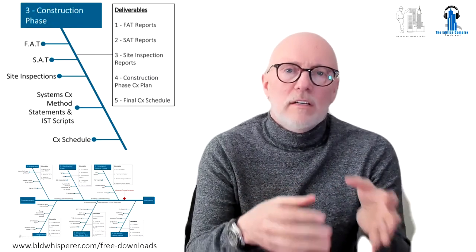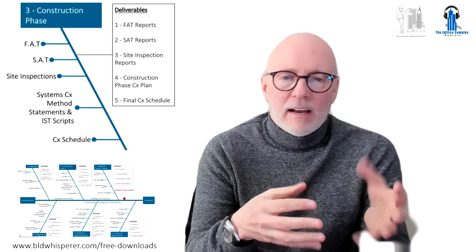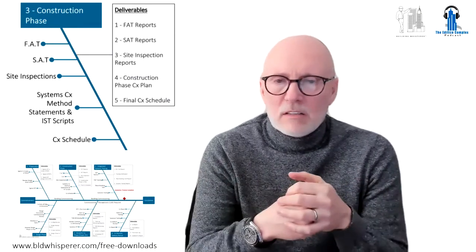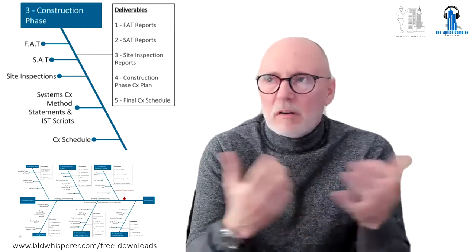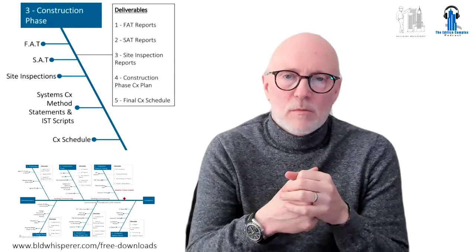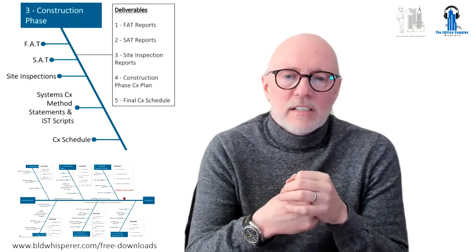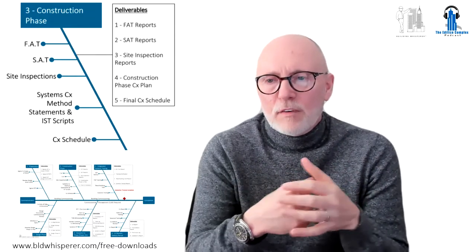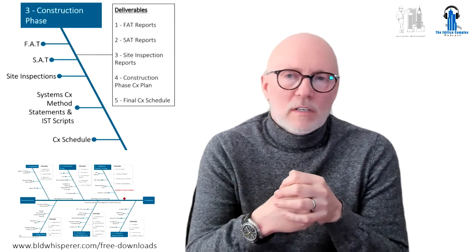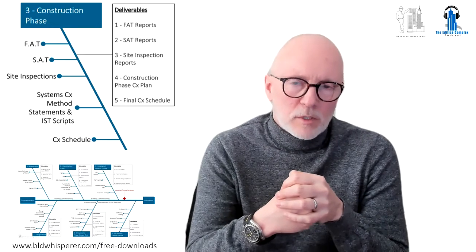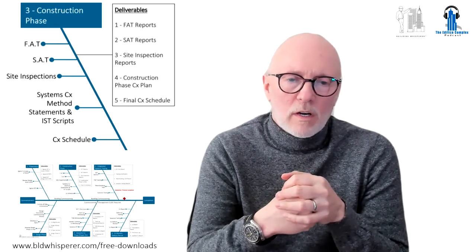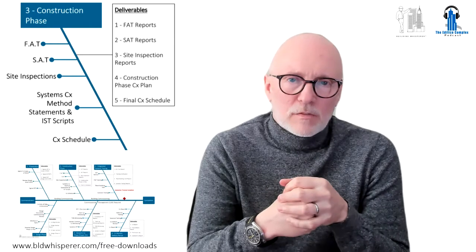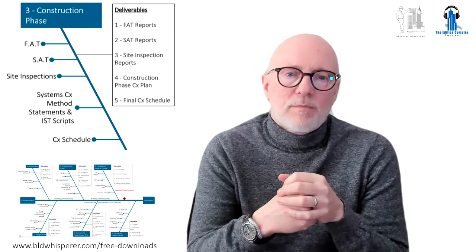The earlier you find it, the cheaper you can fix it. And if I'm there, if there's any other site acceptance testing, ductwork pressure testing for example, we can do that. Again, this is technically optional, but if the building is mission critical, and the more expensive and mission critical the building is, the more this is required, then it needs to be specified. I'm talking to you, design team.